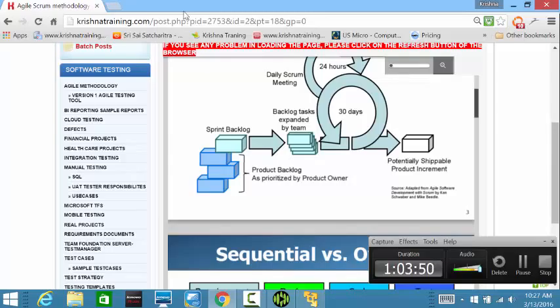No, it's just a sprint demo, but we are not doing the entire product acceptance testing. This is the intermediate stage of getting feedback on the application, where you are quickly reacting to the comments or feedback that was provided. In a waterfall methodology, you would do this during the final stages of the project. So, like that, we will continue.